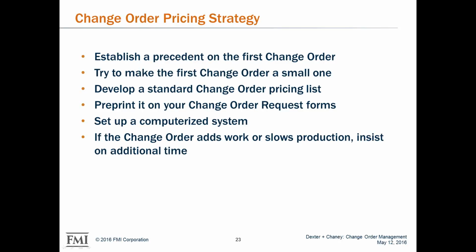Try to make that first change order a small one, and if it's a big one, maybe break it up into a couple different pieces, so that you're not hitting them hard right out the gate. You're kind of easing into it a little bit.